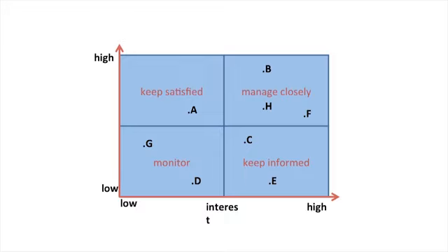A group with high power and positive interest. These are the people you want to have on your project, and you want to create a plan that empowers them and raises their interest. High power with negative interest. These are people who are very strong but have no interest at all. Positive interest, but not too much ability to influence. They are like cheerleaders or supporters that can motivate others, but their ability to influence the results is limited. You want to get them to motivate the key influencers on the project.